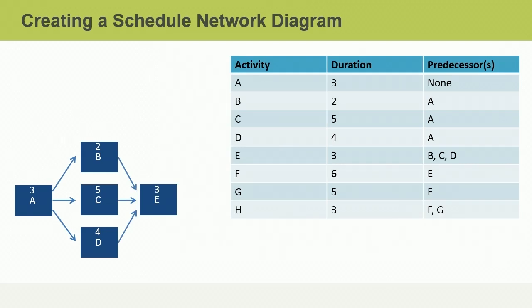Since activities B, C, and D are all predecessors to activity E, the paths merge together again. This is called convergence. What happens next? Feel free to pause the video at any time and resume when you're ready.